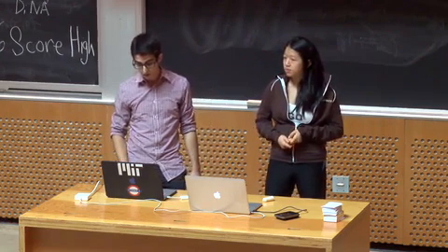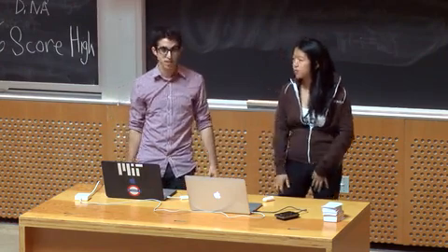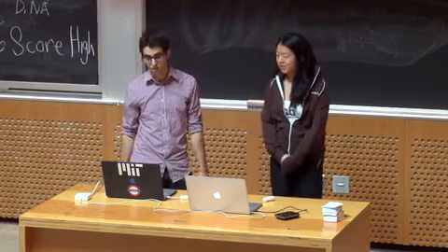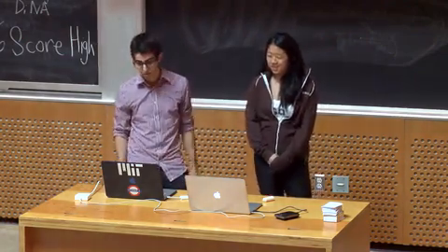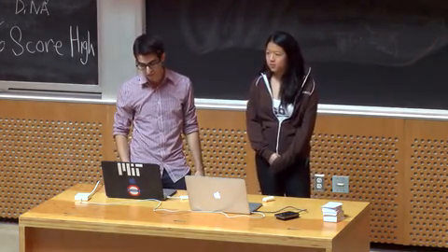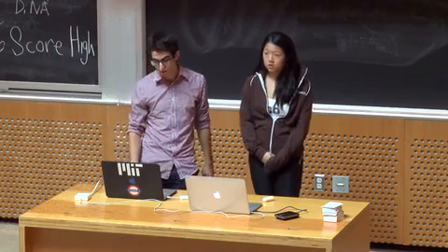Working early and quickly. This was partly hindered because we lost at least 4 days of work because we were trying to get Flixel set up and then it just didn't work and we had to switch to Unity, so basically starting over from scratch. Working early and quickly is super important because we ended up having to drop quite a few features because we didn't get enough done on time.